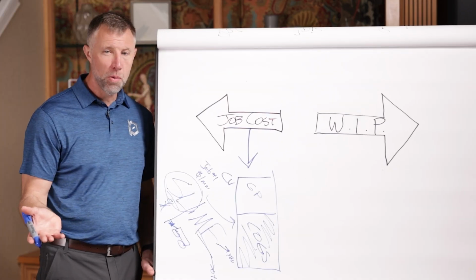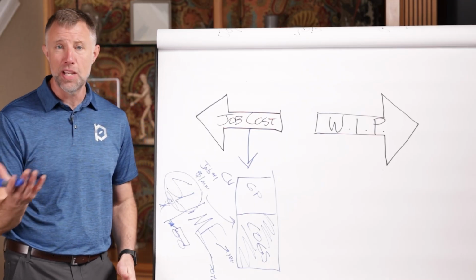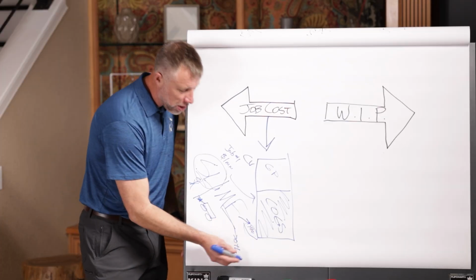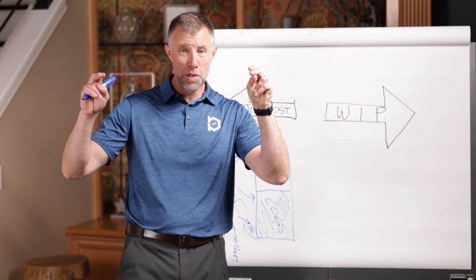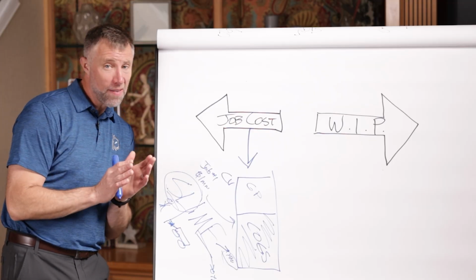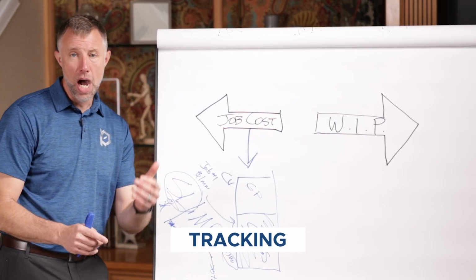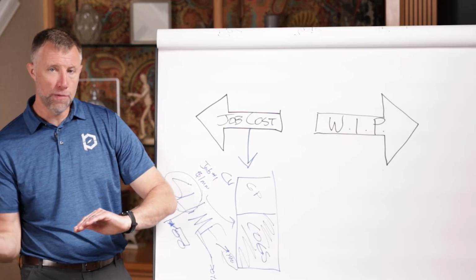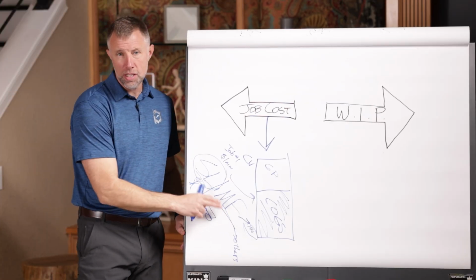Well, that's pretty straightforward because you know what that cost per hour or mobilization or day or half day is going to be. But when you get it from yourself, a lot of times we own it because we think it will make more money on it when we do it. And many times it actually costs us more. Why? Because it wasn't profitable? No, not necessarily. It's because we weren't tracking it and we were actually underutilizing it and overspending for the utility of what we thought. And so in understanding our equipment, it's important to note.